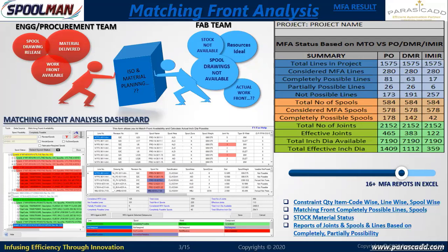And based on the priorities of units, we can set priority at unit level, line level, and spool level. If it is an offshore platform, priority at elevation level. I can set priority as per my requirement based on base material, WBS structure, line level priority, and spool level priority. So we can play around with the priorities, set the data, and then flow forward.